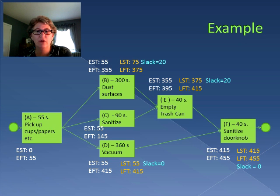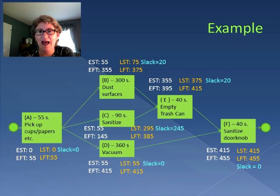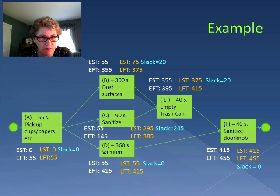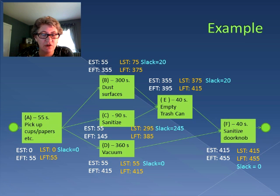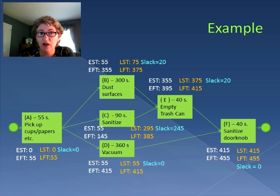We do the same thing for Activity C. And then when we get back to Activity A, let's take a good hard look at that. Activity A must be finished by the earliest time of all of the activities following it. Activity B has to start by 75, Activity C doesn't have to start until 295, and Activity D has to start by 55. So the latest Activity A can finish is 55, meaning the latest it can start is 0, and there's no slack for Activity A.